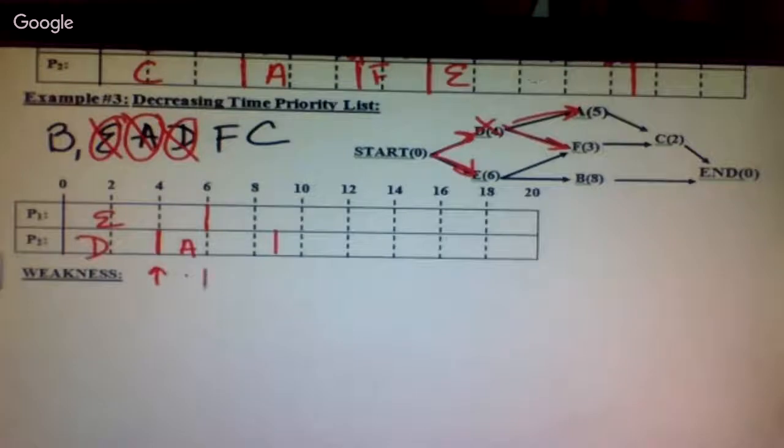We're working at 5, we stop at 6. At 6, E is now finished, which leads into F and B. We gotta do B first. Don't worry about what we're doing first. What is ready now? B and F. Take it one step at a time because if you don't, you're gonna mess it up. So, now that we have these two tasks circled, B comes first. So B gets scheduled first, which takes me to 14.